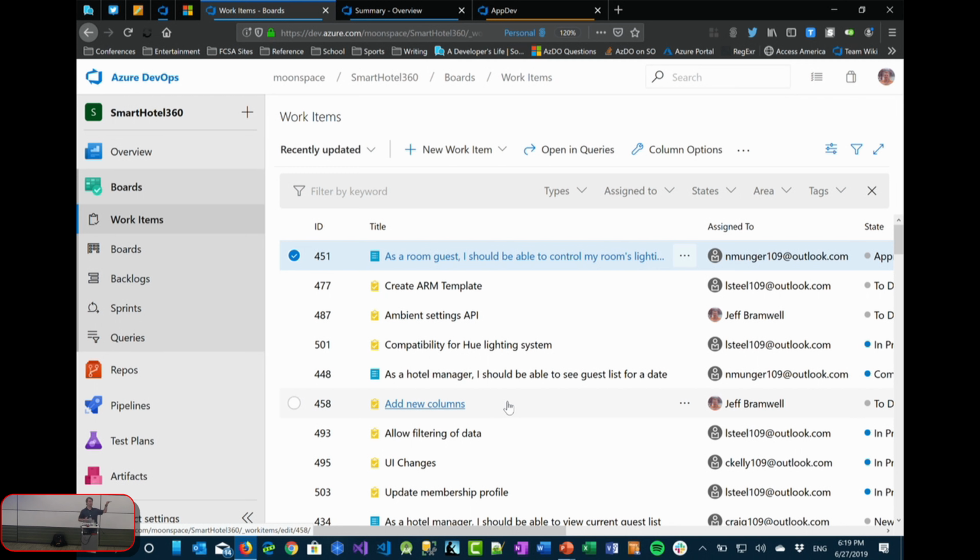And it's this kind of stuff you would expect to see. You know, it's got a title, it's got some tags there, it's got the description, and various other things. You can see history of the card, you know, who's changed what. This one happens to have some links because it's tied to some other things. In this case, this PBI is associated with one bug, a few tasks, and then it has a parent, which is a feature. So you can have, for example, epics, features, and then PBIs in this particular process template. Different process templates might have different hierarchies. That's how this one's built out.